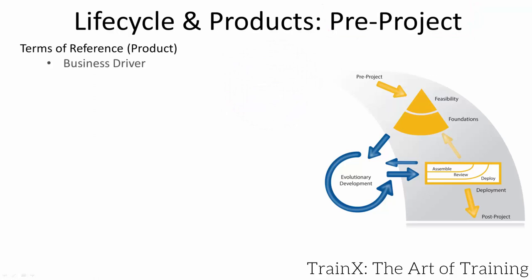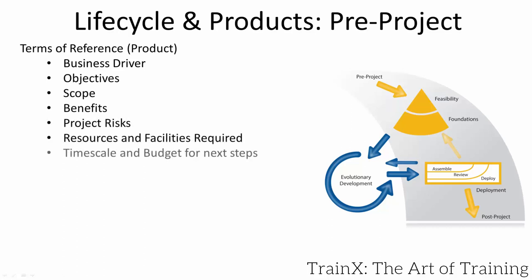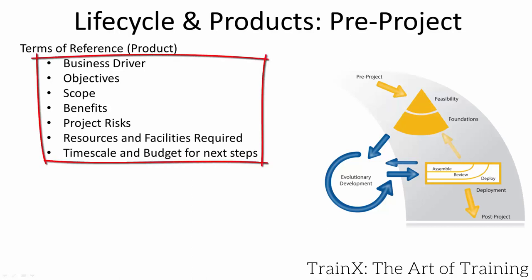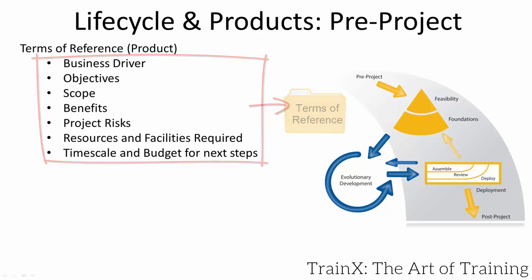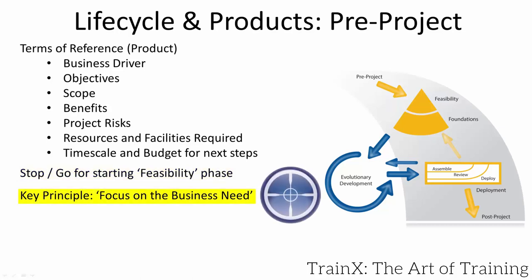The CEO puts all key points from the whiteboard discussion into Agile PM's Terms of Reference product. In consultation with colleagues, she decides to fund Agile PM's feasibility phase only, committing money and resources including a project manager for two weeks' effort. The idea is to establish what the solution could look like at a very high level and see if there are any showstoppers — technically or from the business side. We now have a project.